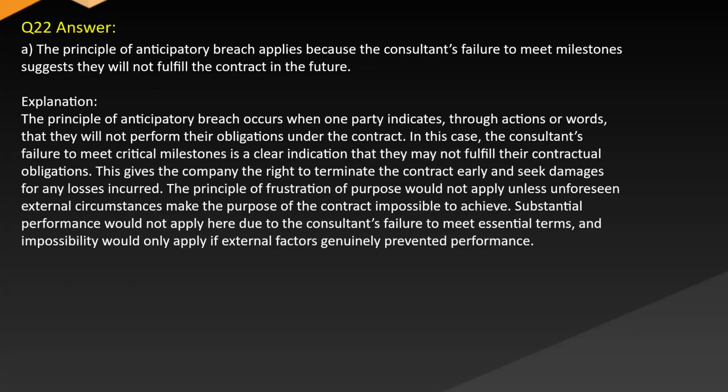Answer: A. The principle of anticipatory breach applies because the consultant's failure to meet milestones suggests they will not fulfill the contract in the future. Explanation: the principle of anticipatory breach occurs when one party indicates, through actions or words, that they will not perform their obligations under the contract.